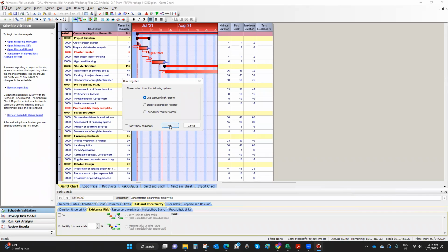All right, so let's take a look here. 3 ways to enter data. In project risk management, after you create a risk management plan, the next thing to do is to start identifying risks, right? So when you identify risks, you enter this risk in a risk register.